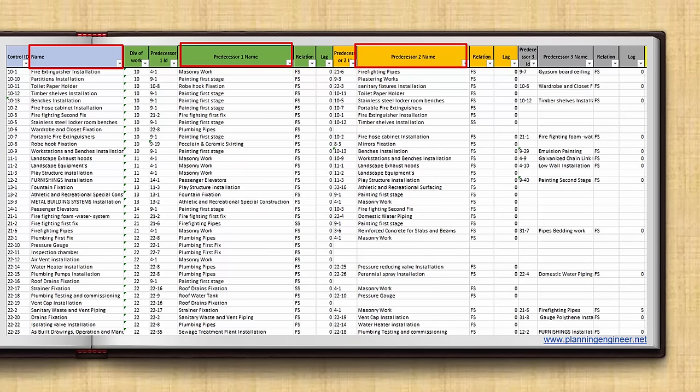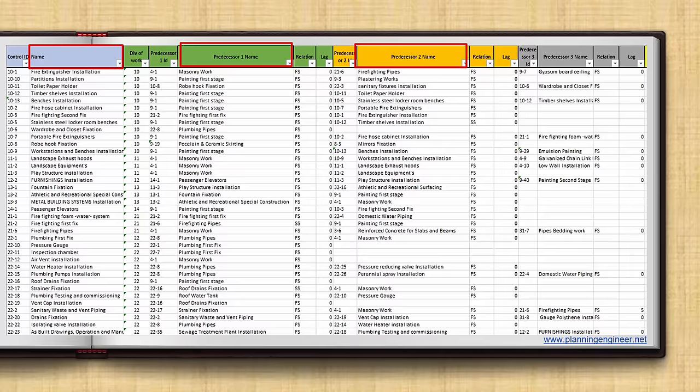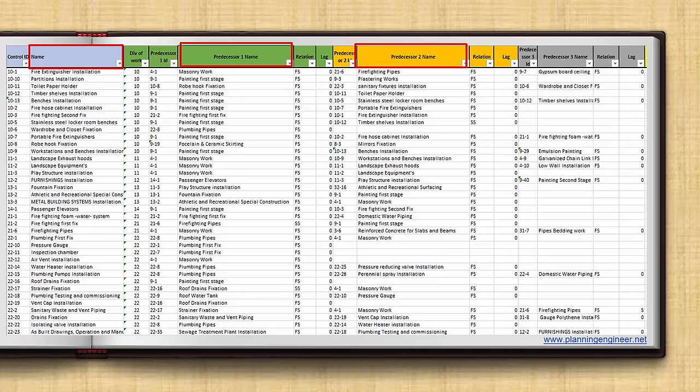By sharing such a document with your project team, they can see how you build thousands of relationships in your schedule by only reviewing two or three pages document. This document helped us import the activities and relationships to our Primavera schedule, but also during construction, it is recommended to share this document with your project team. Ask about their opinion. By reviewing this with your project team and verifying all the assumed information you have put, you be sure that they will be happy to execute it because they were part of creating this schedule.